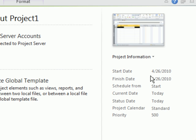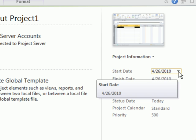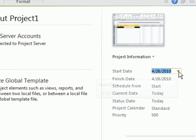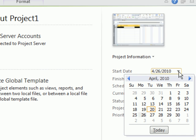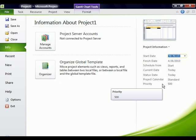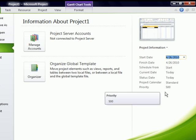Right now it says start date the 26th. If I wanted to change that I could click right in that box there, push the drop down, and choose a different start date. I'm just going to leave it on the 26th. But setting the start date for your project is one of the most important things you can do. That way Project will schedule from your actual start date. It doesn't have to be the current date that you're on.